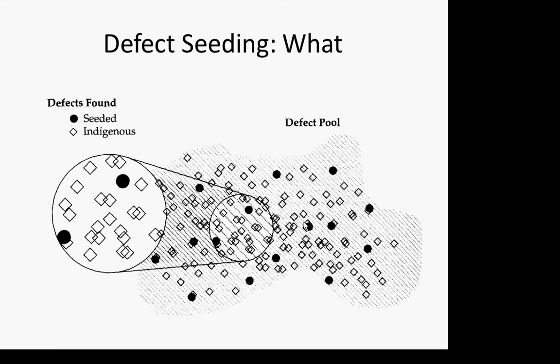You're in a bad zone if you're introducing 50 defects into this code base and you're not detecting any of them within the first 2 weeks of testing. It's not a good sign that your testing is being very thorough.